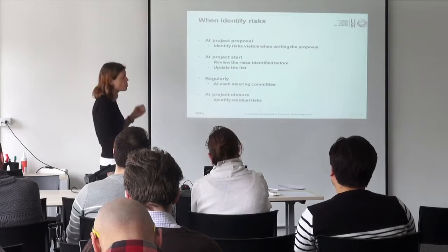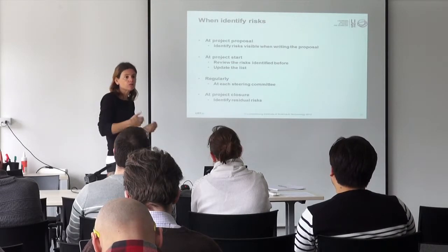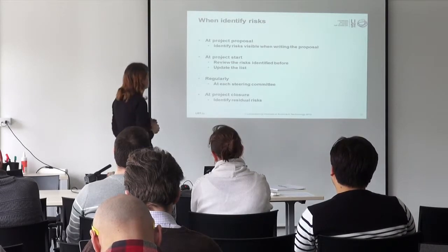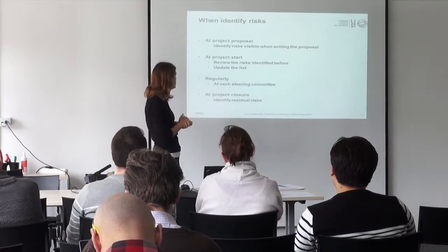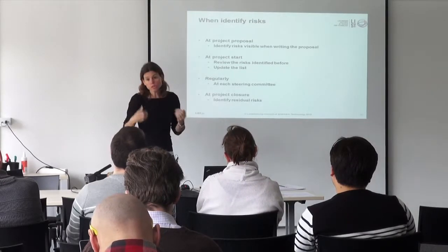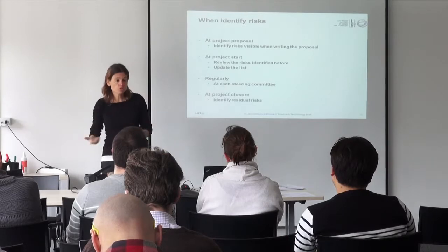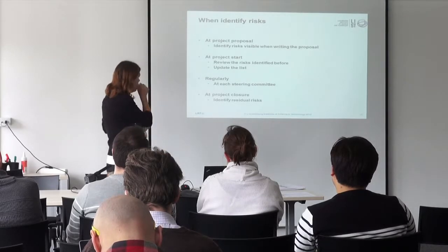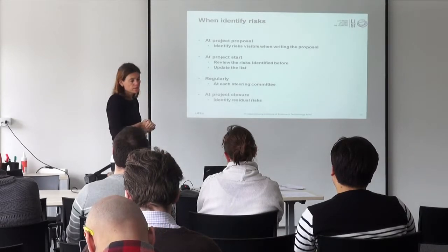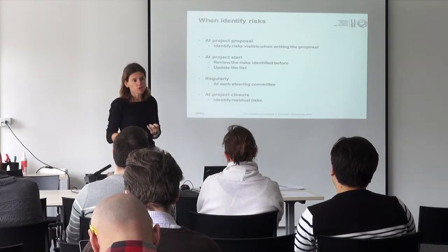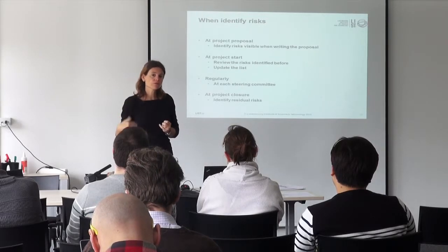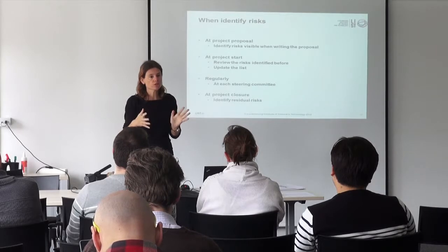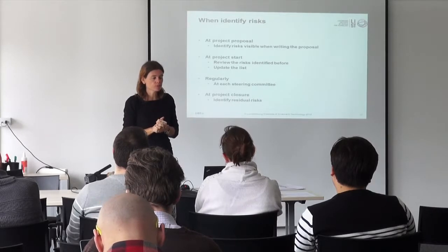So when the project actually starts, you need to go back to that list of risks and see if it's still accurate, and you need to update the list with new risks, new actions. And as I said, regularly during the project, you need to take a step back, looking at the project with a risk perspective.